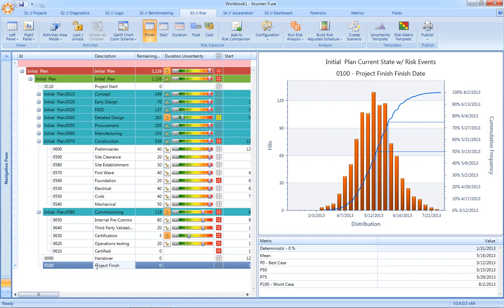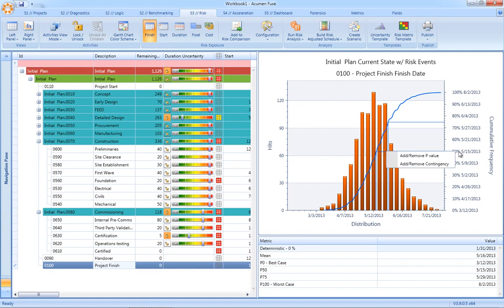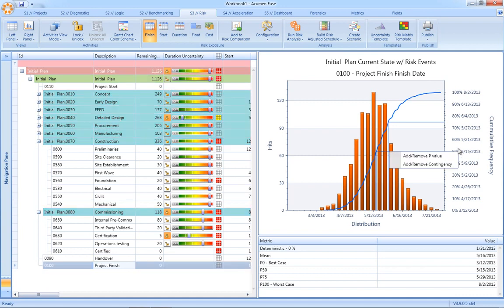This is really the what report. It is what is our risk exposure. From this, we can read off confidence levels against the schedule. We can also read off what we call p-values, an example being what is the date against which we have a 50% confidence in achieving.